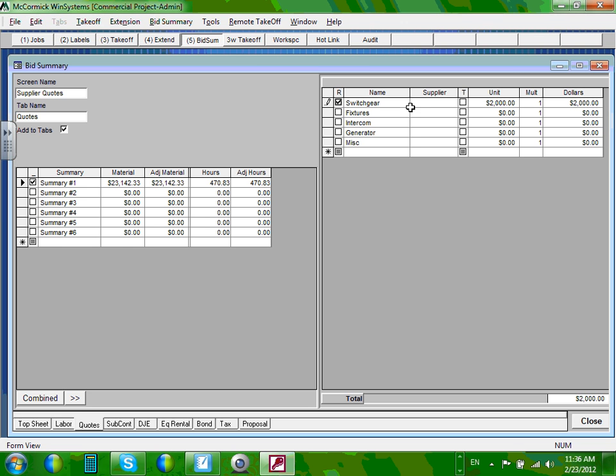If you hit T here, it gives it taxes. It's already taxed. So let's go to the fixture. Click the fixture. The fixtures, meaning lighting fixtures, I'm going to have $15,000. Don't ask me why I came up with these. So put $20,000 for the gear, $15,000 for the fixture because we went fancy fixtures. Cool. That includes all the lighting fixtures. What else? I have a generator, right? We went to Cummins and they gave us a $7,000 generator.